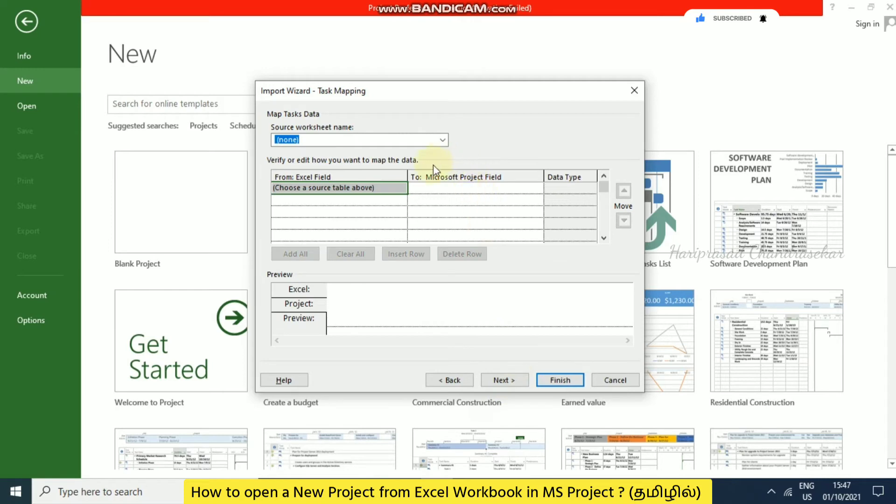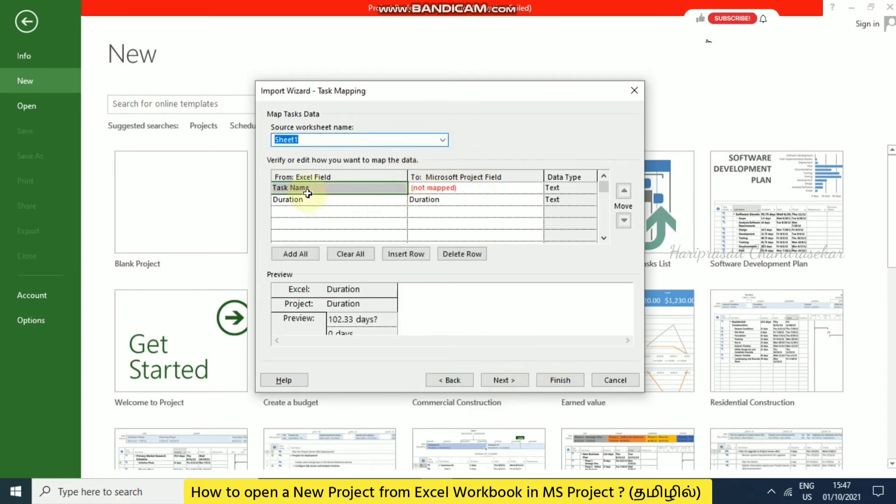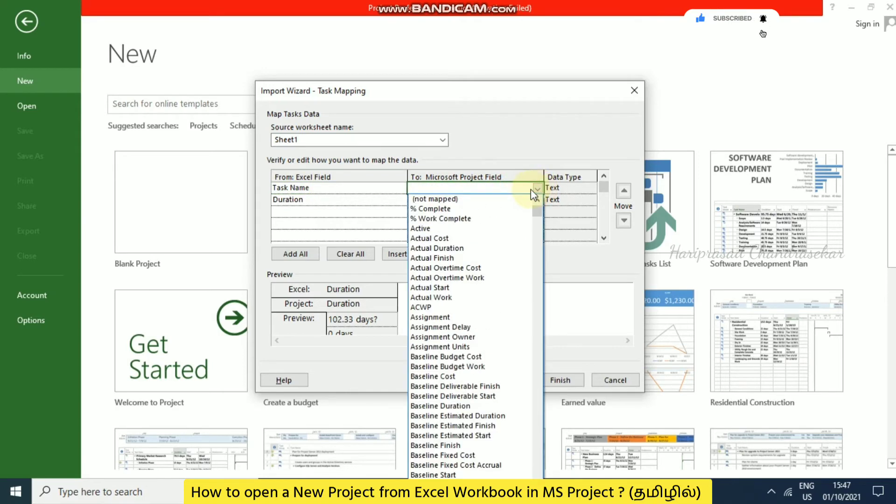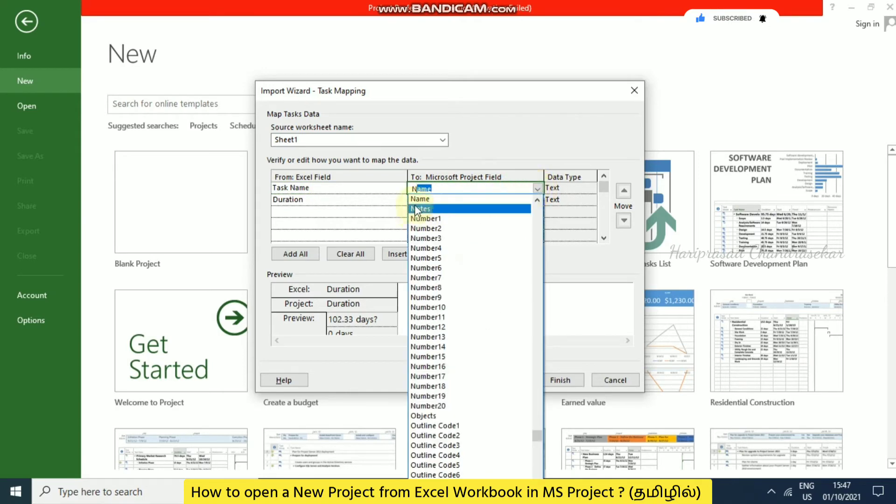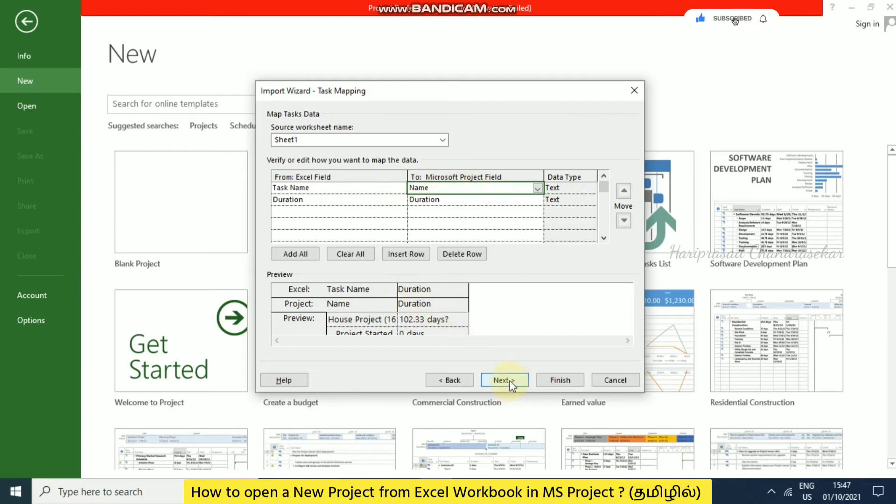Here you need to select the sheet. Which sheet do you have? Sheet one. In sheet one, what are the columns or fields? Task name and duration. See here, automatically duration maps to duration, but task name is not mapped. You need to map accordingly. You need to go for name. Then we can see the preview. Based on that, we can get our output. Now we can go for next.